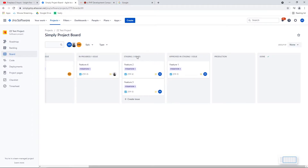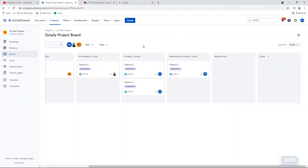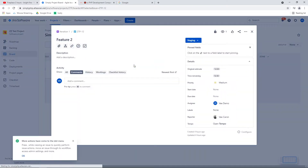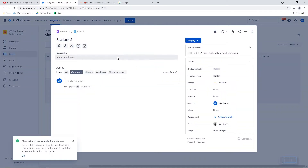Staging — so when I'm done finishing working on my feature, I move it over to staging. Usually staging is the cue: client, you're ready to go test. So on your plate you have feature two and feature three to test. The client would go on staging, on the testing environment, and make sure that feature two and three is working as expected. If you click on feature two there, you'll see the description in the description box.